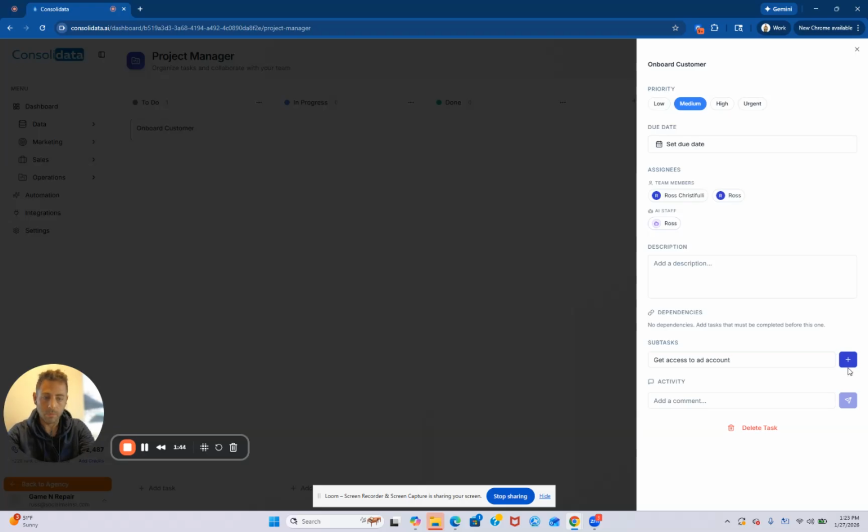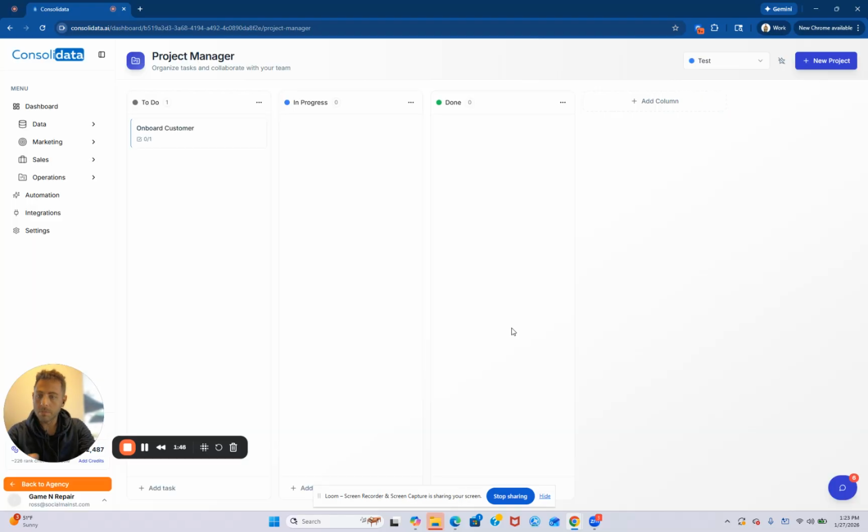So it's pretty simple. But now this might be a completely different person, usually is, than the person who writes the ads and builds the ads. So let's just put here write ad copy and creative and get it approved. This here might not be dependent on anything. And then the next one we might have is launch ads. So let's just say that you had these three things.